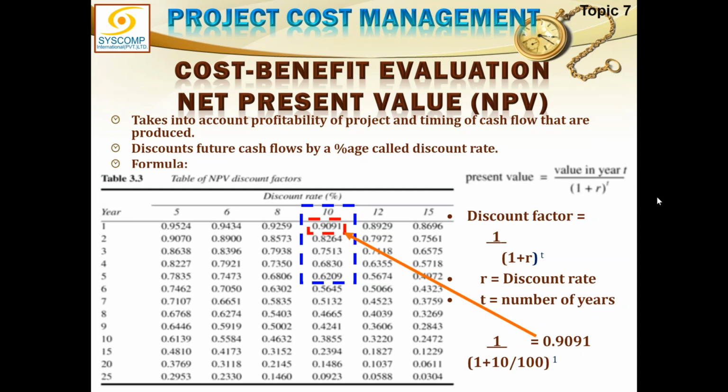Sir, we will apply the formula. Yes, of course, find the present value. But you use this discount table. Use this discount table and tell me which value. Look at what is the discount rate? What is the percentage? Discount percentage is 10%. Okay, look under 10% and look next to 5 years. This is five years. Just keep watching here. The value is 0.6209.